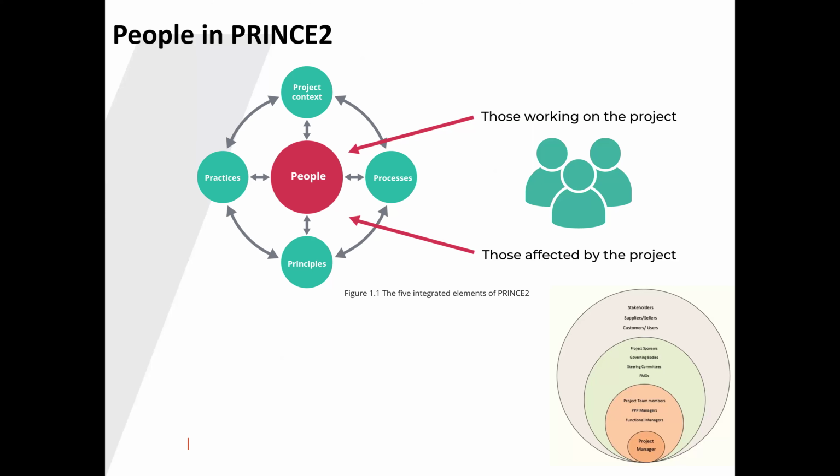Now we want to know what exactly is the power that Deji has and what exactly is Deji's influence or interest on the project. Like we said, Deji is a sponsor. So Deji can wake up tomorrow and say, you know what, this particular cohort, we're not doing anything anymore, we're shutting down. Olawumi cannot come and say we're shutting down. Miracle cannot come tomorrow and say we're shutting down, because his power is not that great on the project.